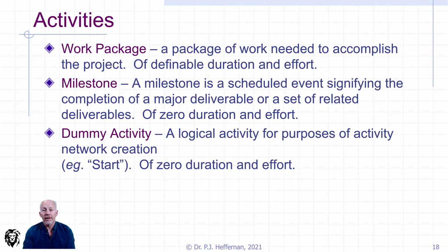And then you may have dummy activities. In order to build your network, not all of the activities are interconnected all the time. So you may come up with a dummy activity, like quite often you'll see a start. Quite often there are many activities that can be started simultaneously at the start of a project, but you need a dummy activity to connect your network and get it all flowing through.